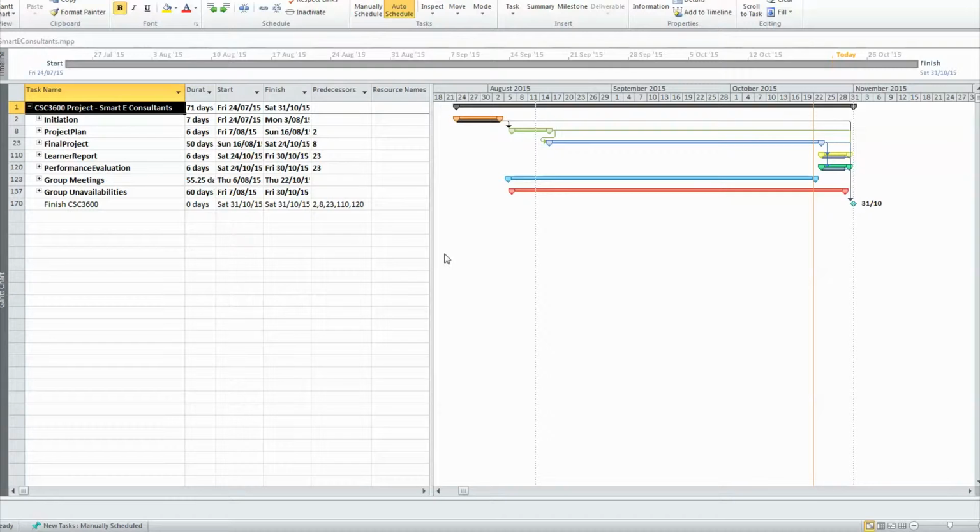As you can see here, the project is broken up into smaller key sections. The sections that our project are being broken up to are based upon the set assessment tasks. Each of these sections has a milestone of the assessment submission date. The project schedule was submitted with the project plan report back on 21 August 2015. As you can see here, the project is separated into 7 main sections. These sections allowed the group to monitor how we were tracking and what tasks needed to begin.